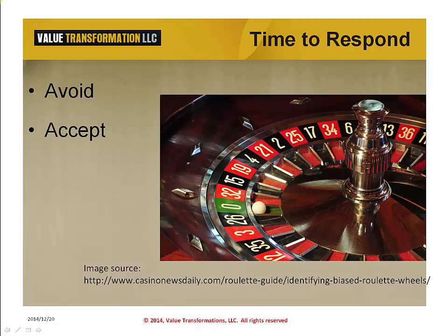Accept is to take no action regarding the risk. We do this when the severity or the probability of the risk coming to pass are low. We may also reluctantly accept risks if we must take on the project. At any rate, we are not interested in reducing the impact or reducing or eliminating the risk.